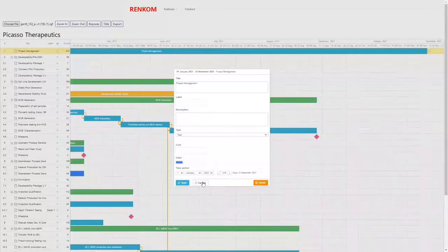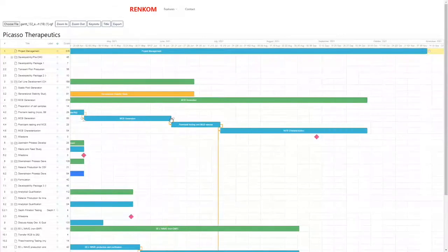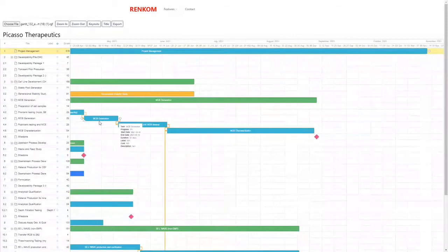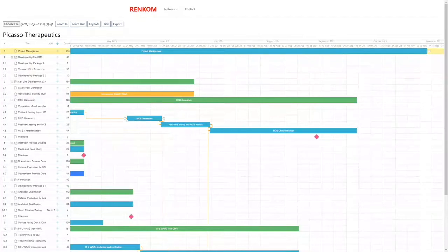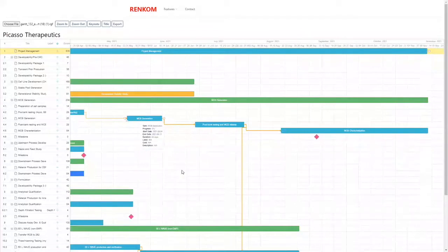You can edit directly on the Gantt to change the timing or duration. To edit the duration, you may do so by clicking on the edge of the bar and dragging it to extend or shorten the timeline. To change the timing of the task, click on the main bar and drag to the desired location. Notice how projects automatically adjust to the duration of the task within them. These features may also be edited manually by double-clicking on the task to open up the panel.